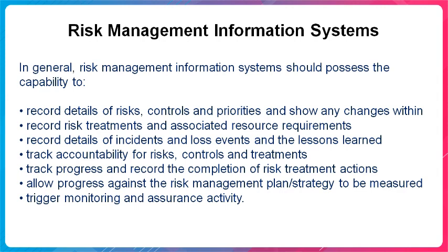with regard to risk. In general, risk management information systems should possess the capability to record details of risk, controls and priorities, record risk treatments and associated resource requirements, record details of incidents and loss events, track accountability for risk control and treatments, track progress and record the completion of risk treatment actions, allow progress against the risk management plan or strategy to be measured, and trigger monitoring and assurance activity.